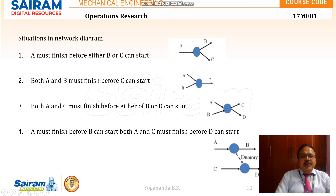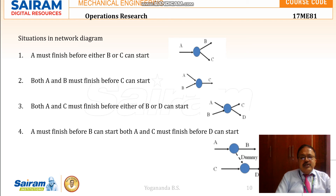Here are the situations in the network diagram. First: A must finish before either B or C can start — I can start B and C only when A is completed. Second: both A and B must finish before C can start — only when A and B are completed can activity C be started. Third: both A and C must finish before either B or D can start.